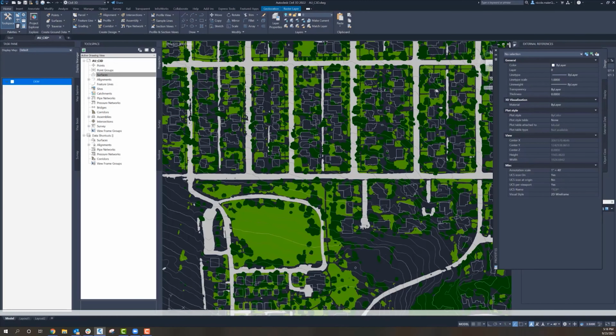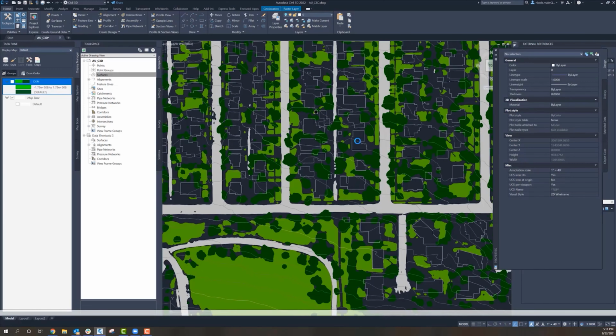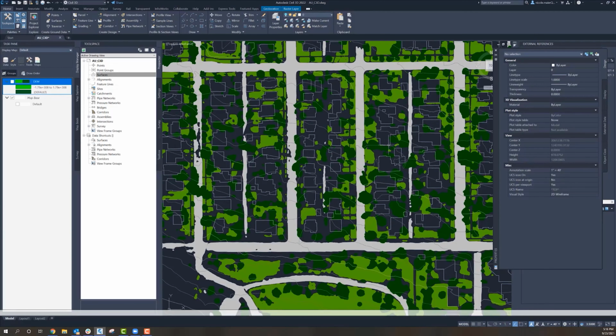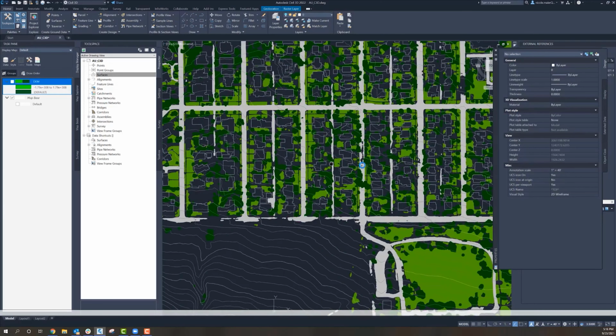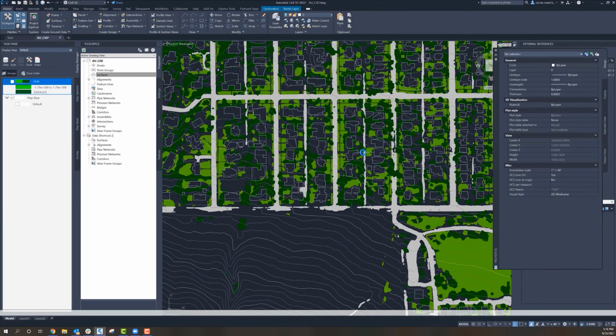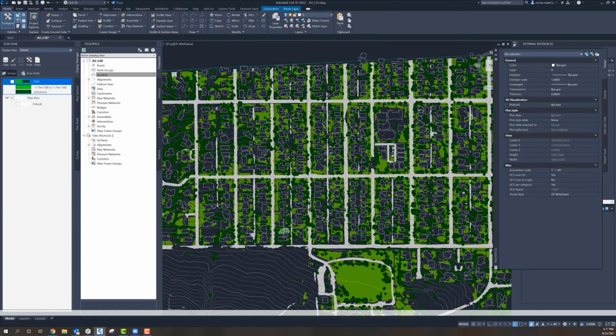If you wanted to, you could get some takeoffs for area, saying, we need to demo a block of buildings. What's the total square area that we're going to lose on that in terms of vegetation inventories? If there are environmental organizations involved in your project, and you need to relay what types of vegetation removal the project is going to be undergoing, you don't need to send people out to survey and collect all of that information, just from the AI. You'll be able to get a good enough start and rough estimate for those calculations.